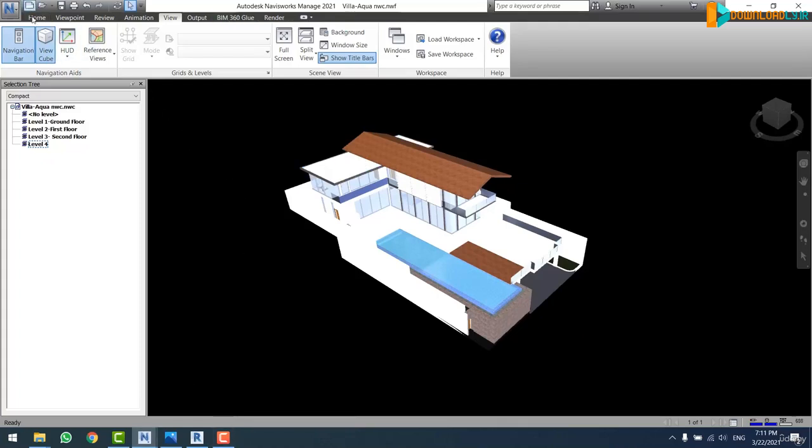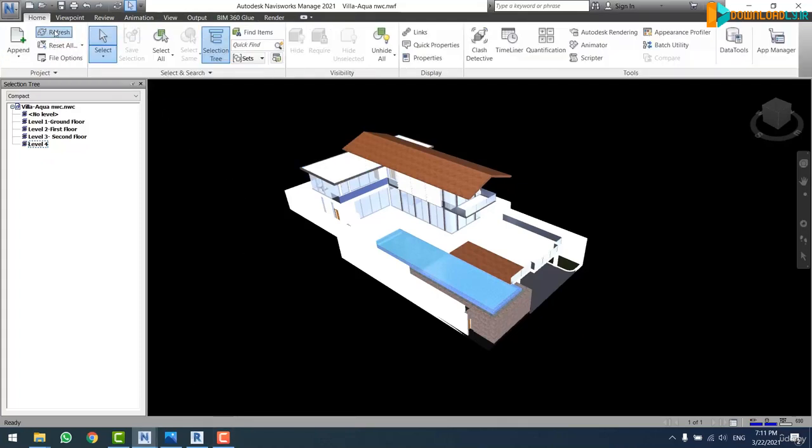Then in the Home tab, I click on Refresh. I click on Refresh multiple times. Check it out. It is not enabled. The refresh is not available. But why? Since we have exported our RVT file as NWC type, and the NWC type is imported to our Navis, the NWC file is not dependent on Revit anymore. In other words, the NWC file is not linked to Revit.